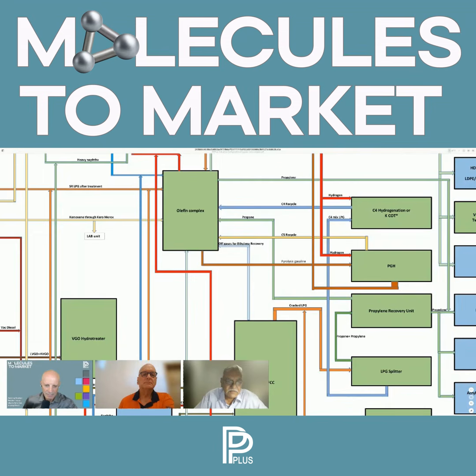If you are going for a managing licensor route, the managing licensor can come a bit early and start his process design, whereas for the downstream units, it may be difficult. But insofar as the DFR is concerned, we will have to complete the licensor selection to a large extent, be it refineries or petrochemicals, so that we have elemental information.